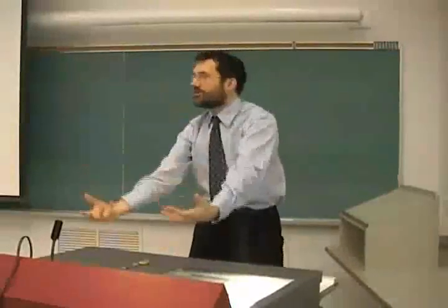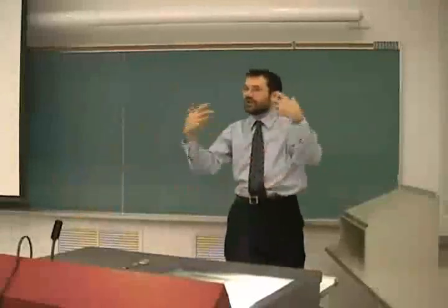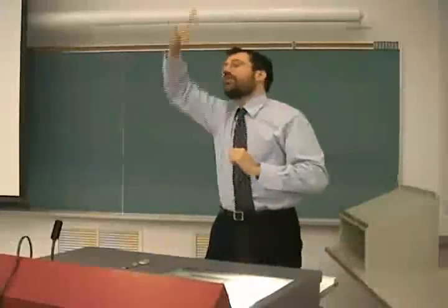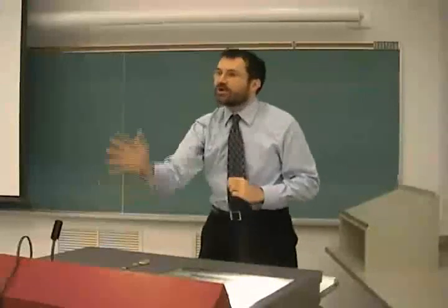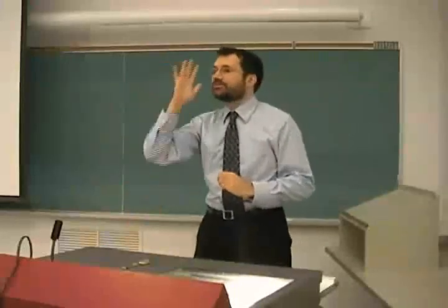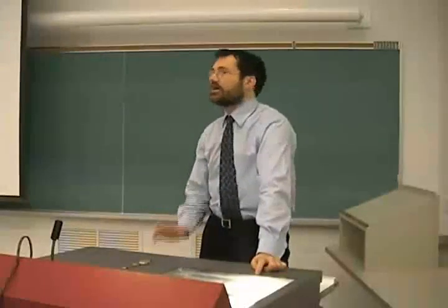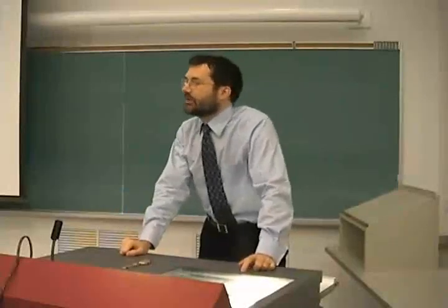They're going to require a computer that will have to be replaced regularly. They'll require software that will be replaced regularly, and so on. And so we weight the cost of a person based on all the other resources they require. But when we're measuring the amount of time and cost the software takes to develop, we use this weighted time. So it's this so-called weighted average cost or burdened cost that becomes how we measure the cost of developing a piece of software.